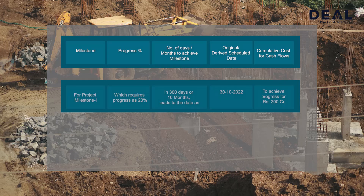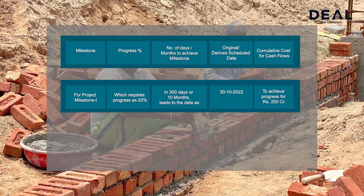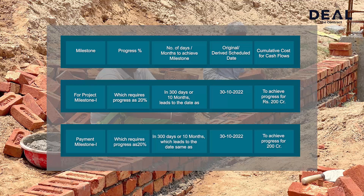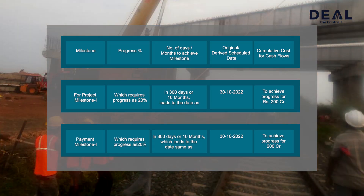For Project Milestone 1, which requires 20% progress in 300 days or 10 months, the date is 30th October 2022 to achieve progress worth Rs. 200 crore. Payment Milestone 1 also requires 20% progress and similarly leads to the date of 30th October 2022 to achieve the same progress of Rs. 200 crore.